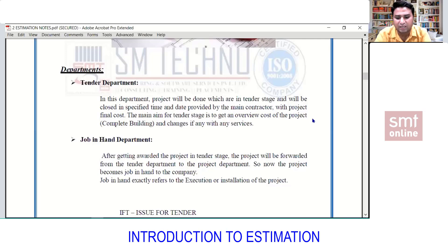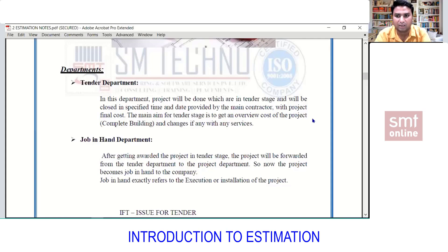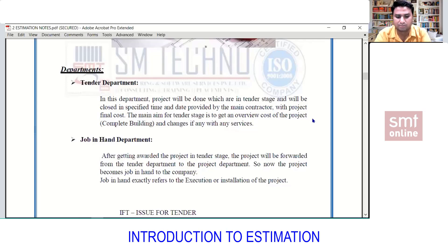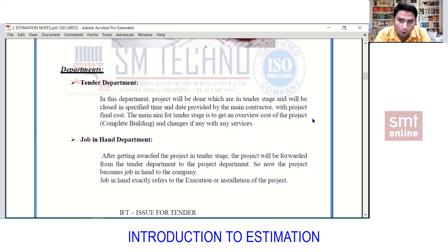The main intention of releasing a project into the market is to get the overview cost of the complete building, not just plumbing and firefighting but all services. Tender has a key feature: it has a closing date. For example, if I receive a project on September 22nd and the main contractor says the tender closes on September 30th, I need to submit the price to the main contractor on or before September 30th. If submitted after that, it won't be accepted.